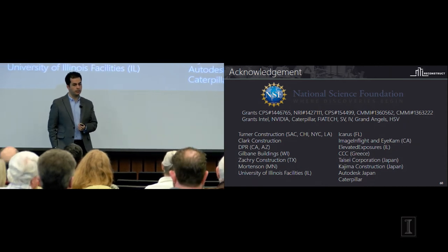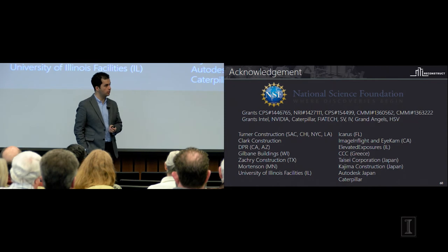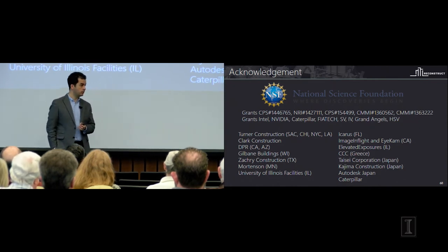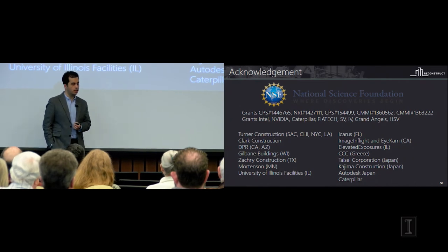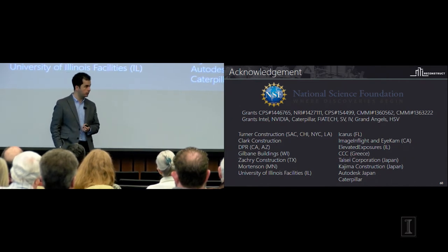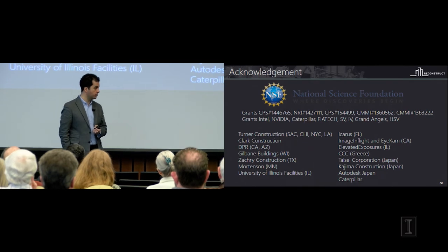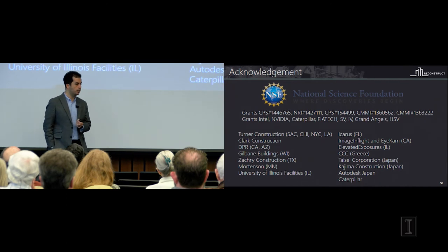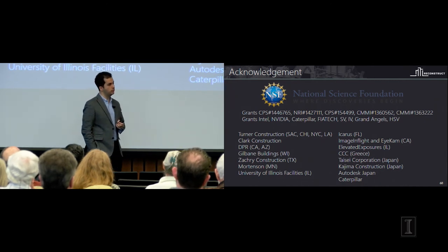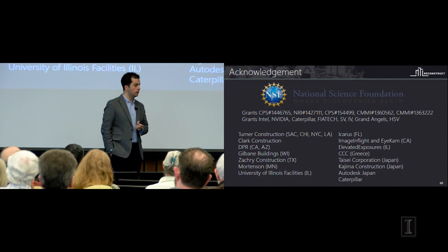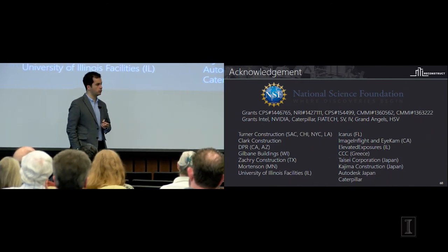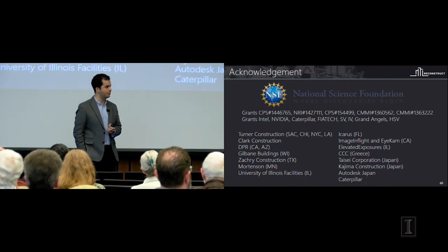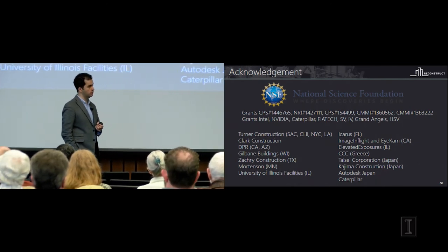The analytic part of it, going from images to these reality models, is a completely automated process. Bringing them into alignment with the plan model is also a completely automated process. Comparing the two is a piece that is not fully automated. It's partly an input by the contractors, so students are not usually involved in that process, and neither is the company. But there are pieces that we are collecting that in the next few years we can definitely automate. The need for the data was out there when we started this work, but with these hundreds of projects that we've done, now we actually have the big data that we need for the purpose of automation. But that's an excellent point.